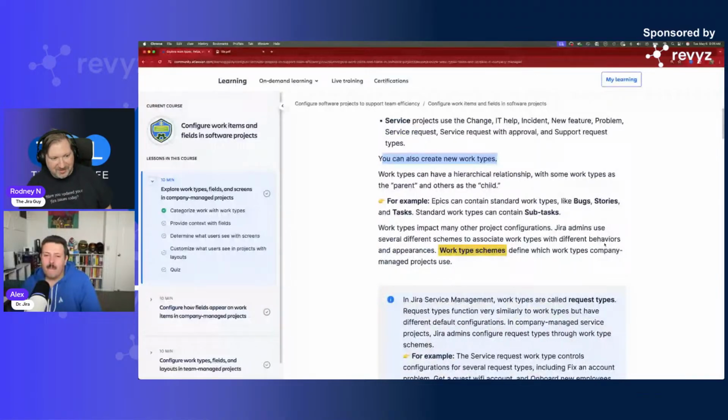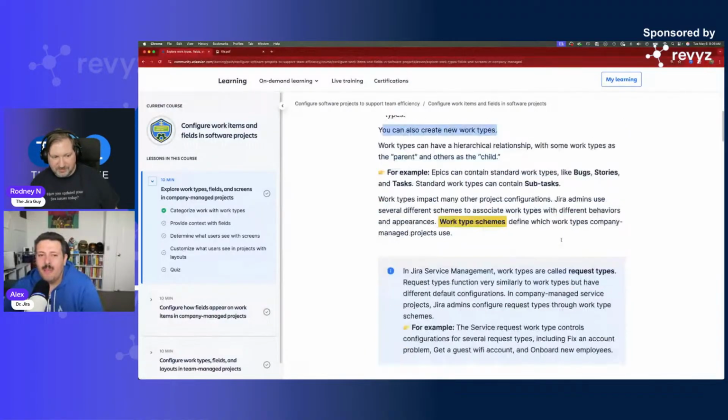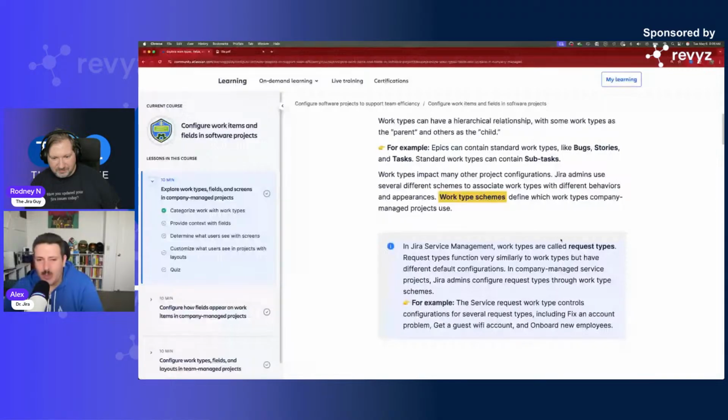Now, one thing you should know is that Atlassian, or specifically Jira, has this concept of a hierarchy. Out of the box, you have a triple tier hierarchy. Your epic sits at the top, then you have your bugs, stories, and tasks below the epic, and then you have your subtasks below the story, the task, and the bug. And if you're on the premium, if you're fortunate enough to be able to afford the premium version of Jira, you can alter your hierarchy.